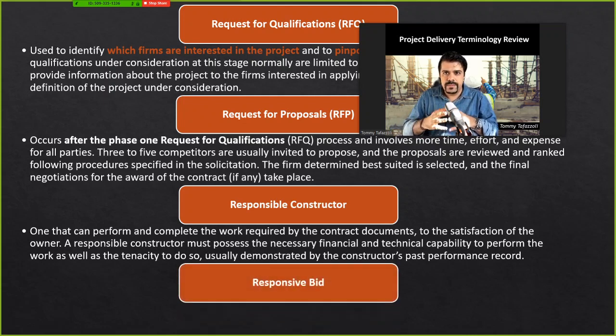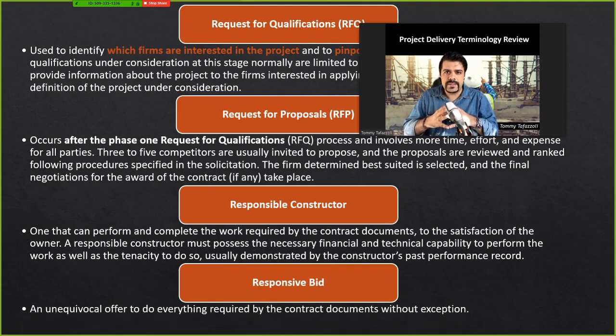A responsive bid. What is a responsive bid? A responsive bid is a bid that includes all the requirements of the contract without exceptions. For example, if there is a big chunk of work that you forget to do the pricing in your bid, you're automatically eliminated from the competition, regardless of you have provided a very quality bid for other parts.